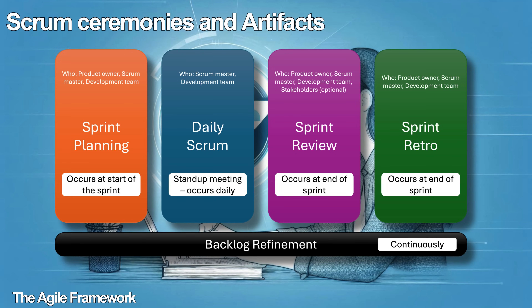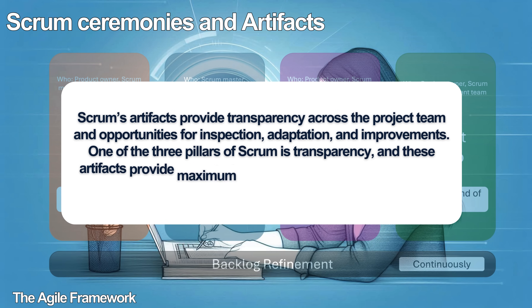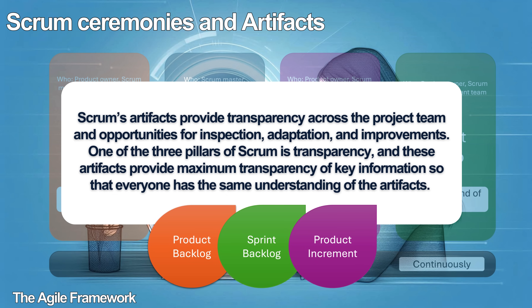What is a Scrum ceremony? Mandatory meetings in Scrum are called ceremonies. There are four mandatory meetings that should happen at specified times: the sprint planning, the daily Scrum (also known as the stand-up meeting), the sprint review or iteration review, and the sprint retrospective. Each ceremony can be differentiated by who is responsible, when the meeting should occur, the expected output, and the objective of the meeting. There are also other meetings such as product backlog refinement, as well as meetings scheduled as needed for issue resolution or risk assessment. Scrum's artifacts provide transparency across the project team and opportunities for inspection, adaptation, and improvements. Product backlog, sprint backlog, and increment are the three artifacts of Scrum.